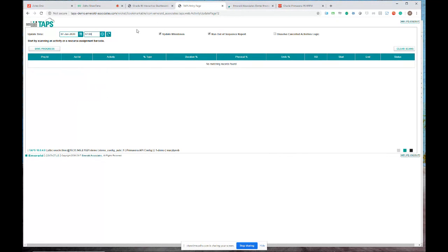Now, we've got a couple of other options here. You'll notice that update milestones is on by default. You're probably wondering, well, what does that do for me? What it does is if I have a milestone that is attached to an activity that I complete, I don't have to scan or go in and progress that milestone. It will automatically set it to complete.